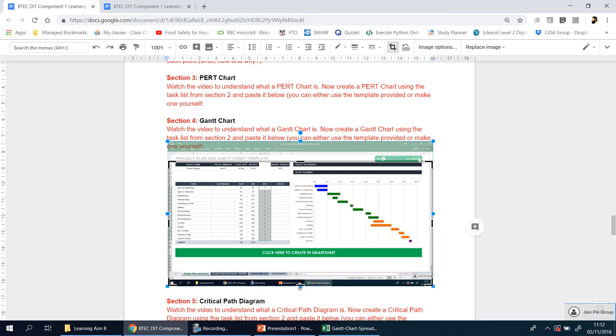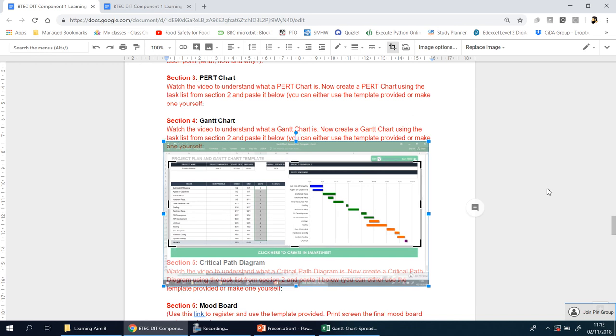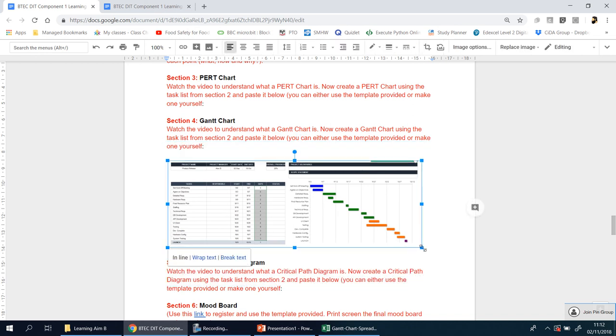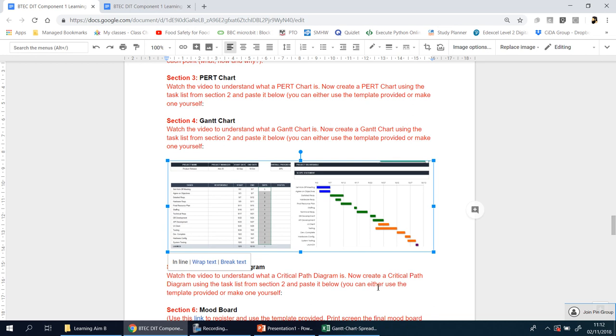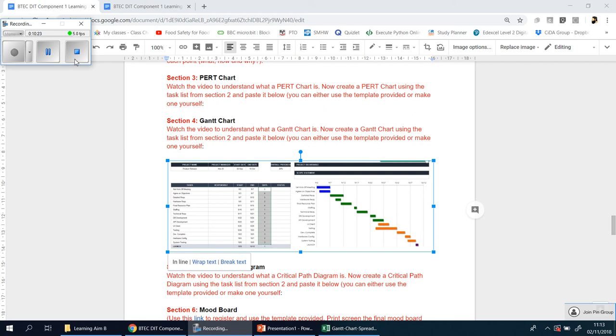Just remember that you're not getting everything in, you just want the table and the chart. So this is not finished yet, you will have to do it properly. You basically drag this down and just copy what you need in here, like so. And that's all you need, simple. You can make this a little bit larger so you can see it better. So obviously you need to use section two with your task list, fill that in. When are you hoping to start? How many days will it take for each item? Then calculate the days it will finish and then the chart should automatically update itself. That's what you need for this section. Hopefully that is easy to understand and helps you.